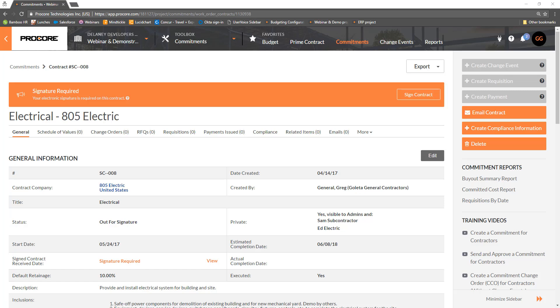When it's a Procore user's turn in the DocuSign workflow, the banner reflects it's their turn to sign the document. Signers are also notified by email and are not required to log into Procore to be notified their signature is required or to sign the document. Signers can sign the document from any internet-enabled device, including mobile. Signers do not need their own DocuSign account.